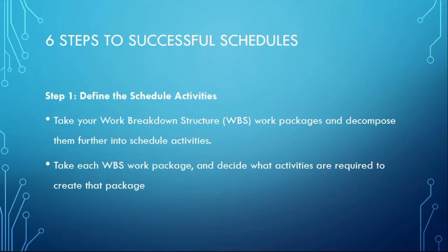So you do that for the initial phase, you do that for the intermediate phase, you do that for the final phase. So if you have a project at hand, first of all, split that project into work packages. That's number one. So there are three steps there. First of all is define the project I want to do. Split that project into work packages. And remember, your work packages should fall under three phases: initial phase, intermediate phase, and the final phase.